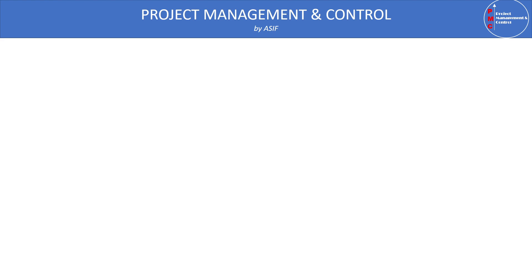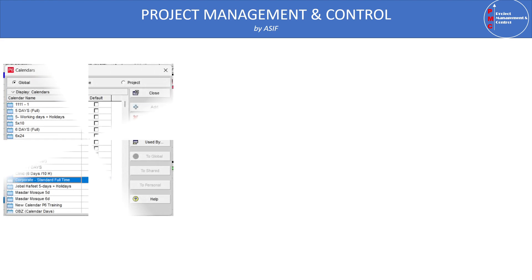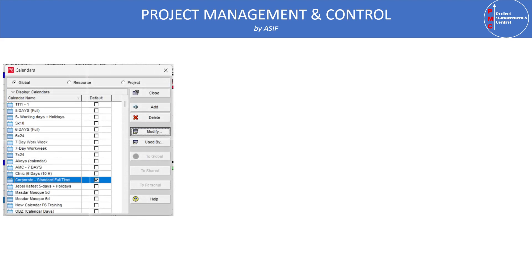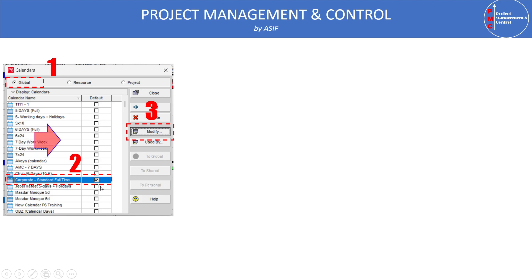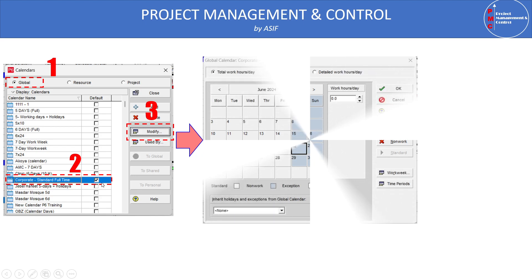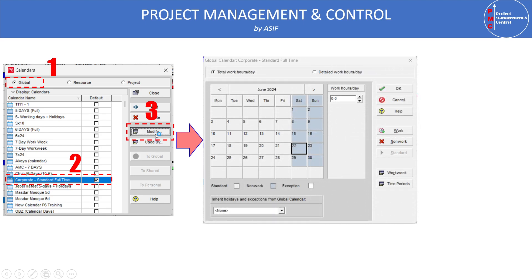When we open Primavera, we go to the Calendar option. In the Calendar option, three options are available: Global, Resource, and Project. Select Global and you will see many calendars listed, including a default one. Select the default calendar and then click Modify.